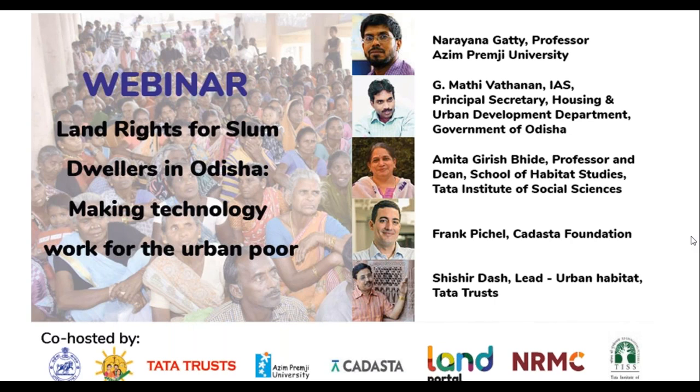Mr. Madhivadanan, would you like to give your final thoughts and wrap it up? Yeah. We have now reached phase two of the program. Phase one, giving land rights certificates on an in-situ basis, is almost over. Now we have reached the saturation stage, and we are moving people to new habitats wherever the slums are untenable. There are about 670 such untenable slums in the state, and about 70,000 to 100,000 families are required to be moved to new habitats.